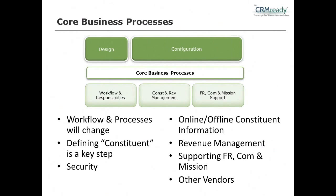that it might be a month, maybe 6 weeks or whatnot, is that you want to have a chance, to Smita's point earlier, to meet with every key business unit and make sure they have sufficient time to have their say and to circle back for a second round for clarification as well. And just inherently, that's typically going to take, regardless of the organization size, it might take a month, or it might take a month and a half to really make sure you have a chance to ask the first time and then develop it with a round of follow-up as well.